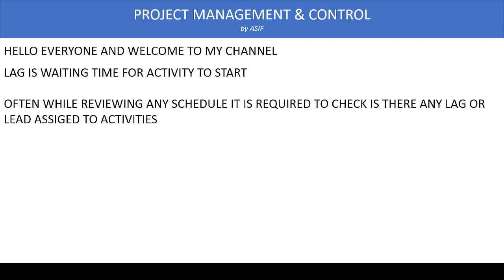When we receive a program from a subcontractor or supplier, we check the quality or health of the program. One health matter to check is how many activities are assigned with lag or lead times.